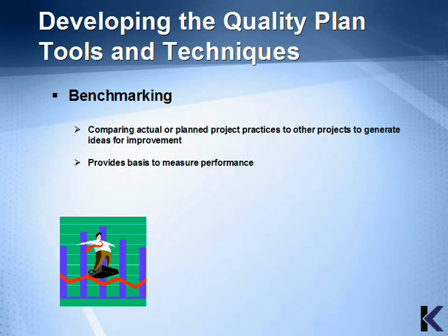Benchmarking compares actual or planned project practices to other projects to generate ideas for improvement. It provides a basis to measure performance. Let's stay with the example of phase-end reviews of deliverables. A similar previous project may have reported 200 defects, which meant deliverables had to be returned for rework. This would be the benchmark.